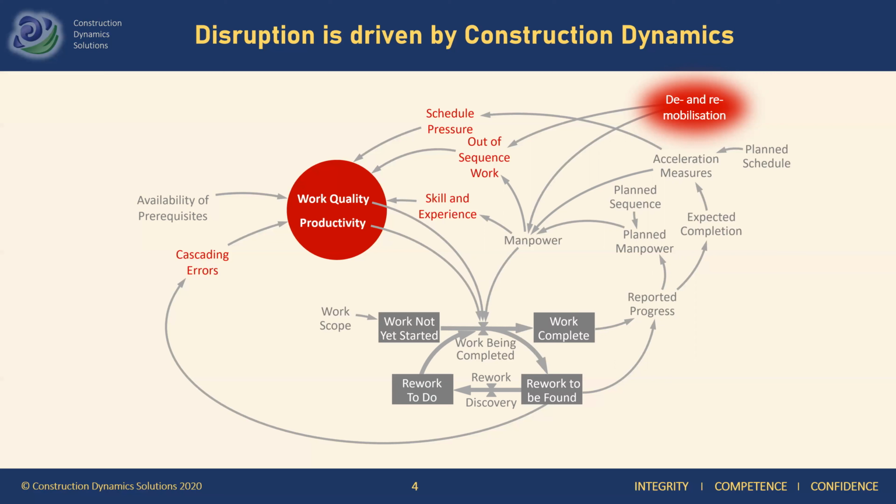It's been months since you made them, you even forgot what happened then, and suddenly now you're facing this mountain of rework coming apparently out of nowhere. So you have to divert people to fix things. Again, you'll fall behind. Again, you'll try to accelerate. Again, you are disrupted.